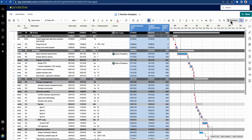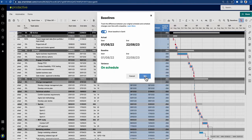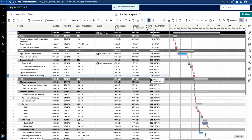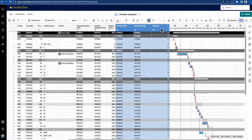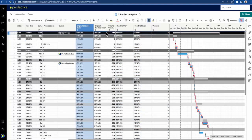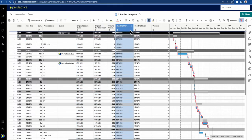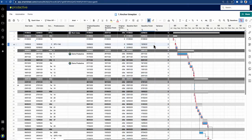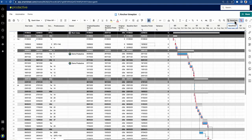Once you've secured the original baseline record, you can set a new baseline, and new baseline columns are added. You can have baseline after baseline recorded, giving you a history of what happened over the course of the project. This feature is available to people with admin access — you don't want just anyone resetting the baseline. Think about whether project managers should have admin or editor access, and consider having your PMO manage baseline resets.